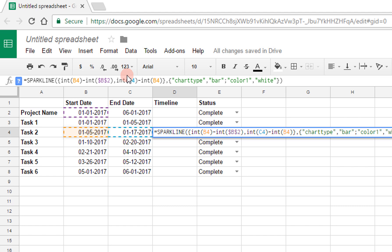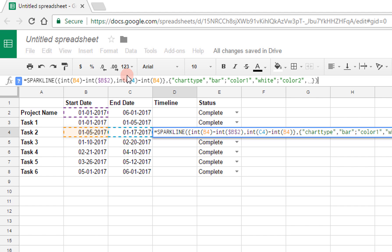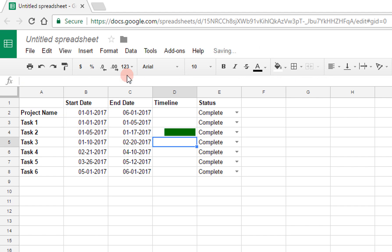So I'll say color 1 is going to be white. This is going to make the first segment invisible, and that's exactly what we want. You'll see the result in just a moment. And the second color, I'll specify color 2. And for now, just for illustration, let's make this green. And that's it. So this is what I would get if I were to do that.